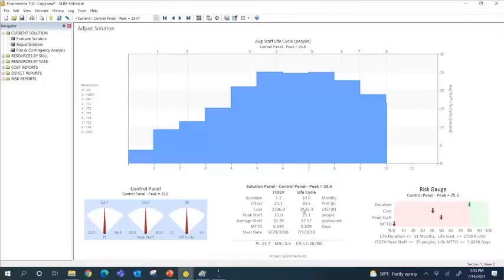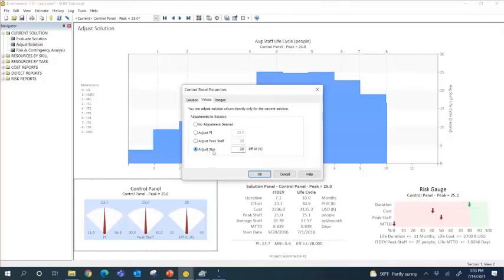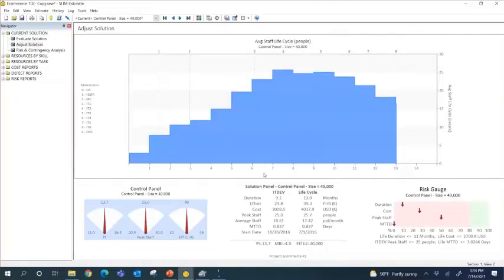Can they live without those extra features, things like that? So we're negotiating. Another trade-off I might look at is, how much more is it going to cost if we add all that functionality in? So I can quickly see. These are all estimates within a couple seconds here. Once I have a template built, I can run the estimates pretty quickly. So more functionality or value delivered, it's going to take me longer. It's going to cost me a lot more money.